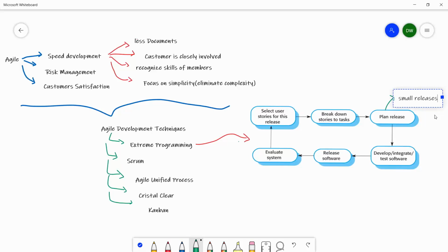Right? And another important thing when you create these story cards. Here I'll write that when you break down the whole original customer story into small tasks, we write it down as a story card, right? When the team members work on this story card, they work as pairs.